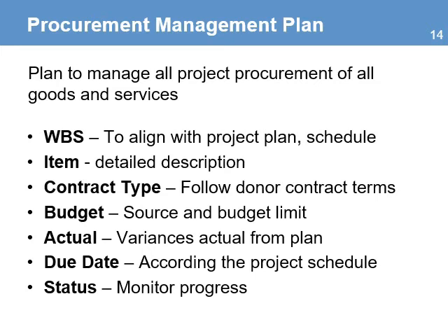The other important management plan that is part of the contract processes is the procurement management plan. The procurement of all goods and services required by the project requires a lot of time and effort. That is why there is a need to have a procurement plan that helps manage this process. The plan is aligned with the WBS and the schedule.